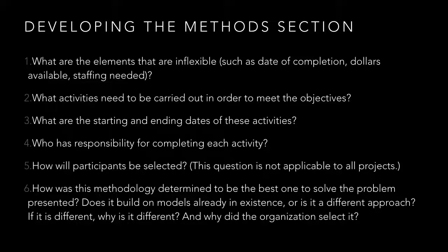So how do you develop the methods section? Well, I liked what the book had in terms of questions you can ask yourself. So what are the elements that are inflexible, such as there's a particular date of completion, there's only so many dollars available, there's only so many staff that you have, or there's an amount of staff that are needed. And then you would think about that, and that would help you frame the scope of your methods. And then also, what are the activities that need to be carried out in order to meet those objectives that you wrote in the previous week?